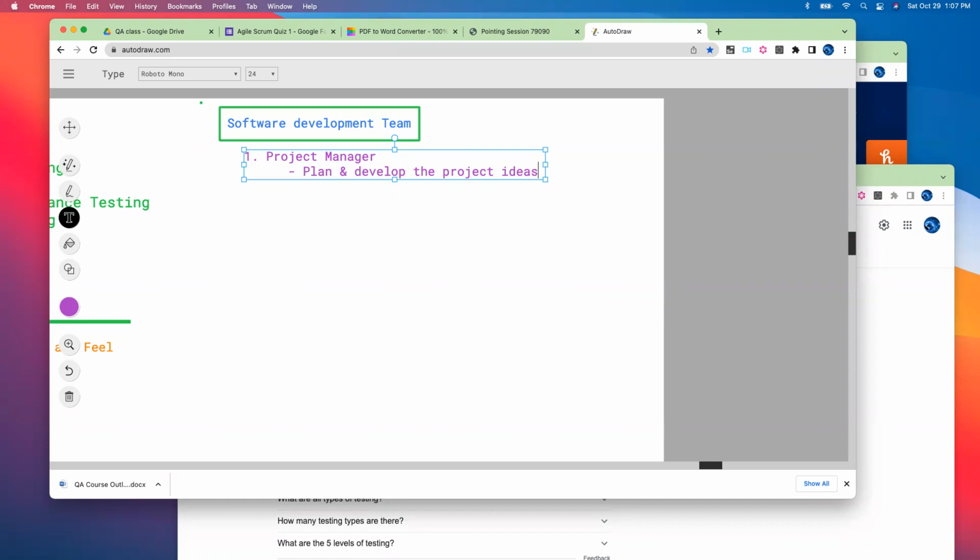That includes budgeting, hiring, firing, and hearing from the team to understand the progress and the budget and see where the whole team is, and then taking appropriate action based off of that. So if the team is behind, the project manager will say, do we need additional resources, maybe additional QA? And any problems that arise during development, they will try to solve. But more importantly, he will talk to the stakeholders, right?